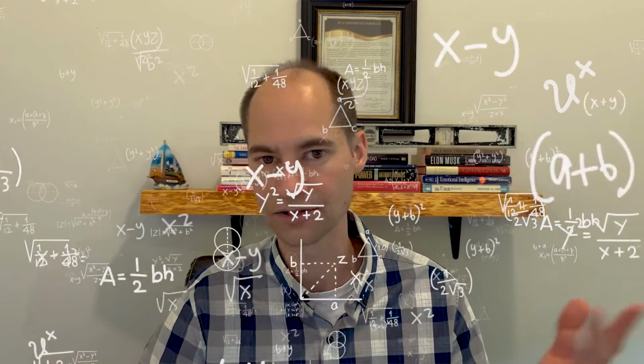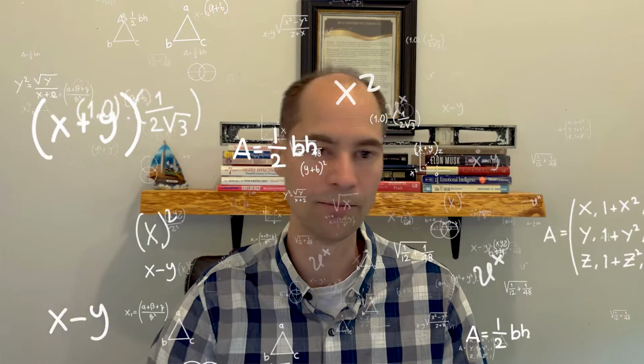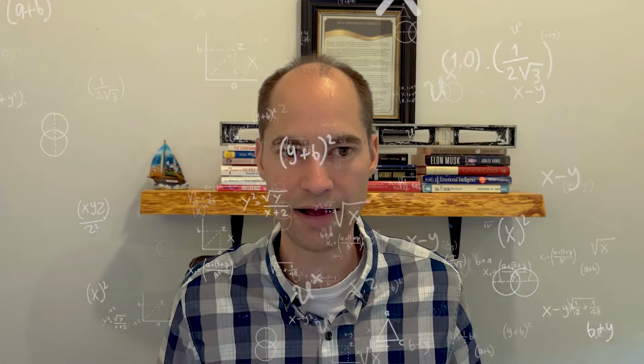And so you don't have to go hunting around for like, oh, how much is a 2x4? How much is PEX plumbing line? How much is this or that? You shouldn't have to go searching around every estimate you're doing. It should all be in the database, so it's quick, it's easy, it pulls through, and it's all set up for you. So get that set up. Usually just a spreadsheet, and there are ways where this can be tied to actual suppliers that you use, or even other databases, but that's getting a little bit in depth.